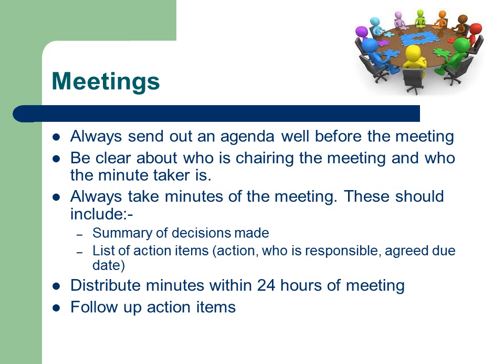It's not good practice for the chairperson to also be the minute taker, as this results in delays or missed information. The minute should be a summary of decisions, not paraphrases of the discussion. Action items must be documented, ensuring that a person is responsible for the action and a due date is agreed. Minutes of meetings should be distributed within 24 hours of the meeting being held.